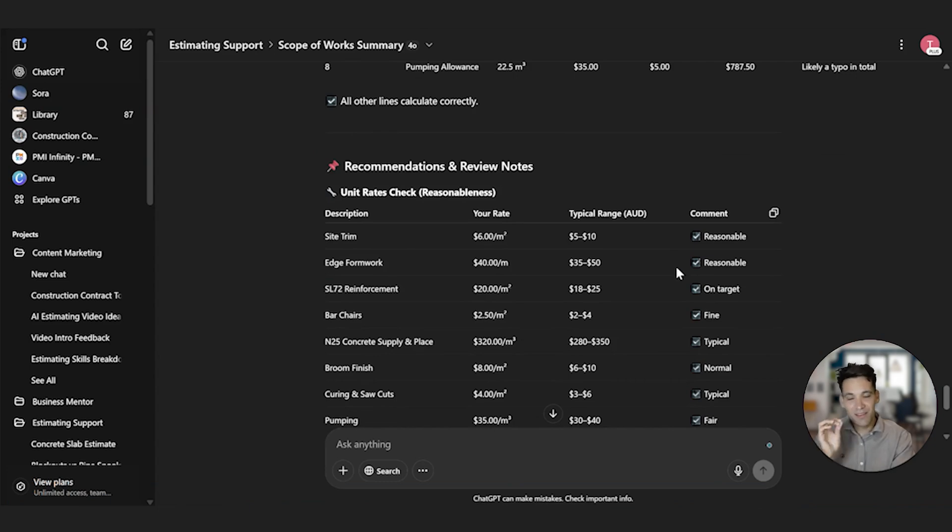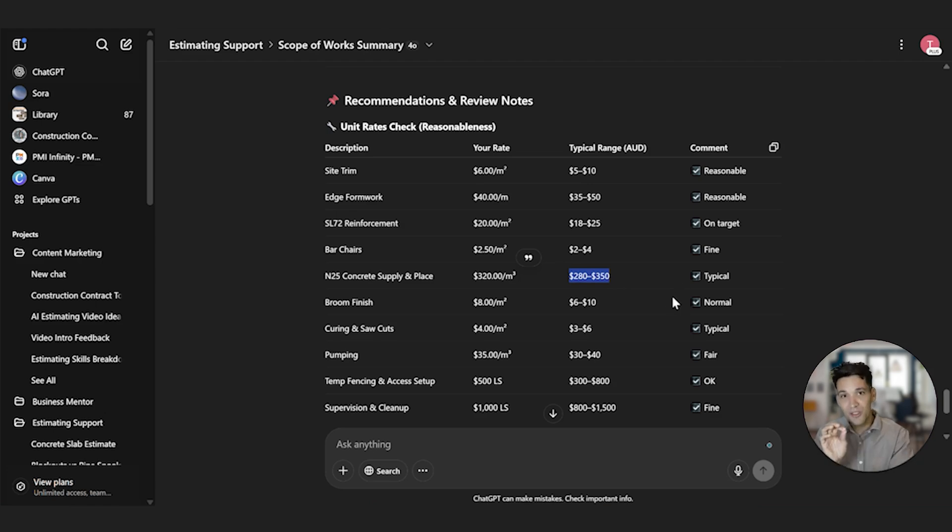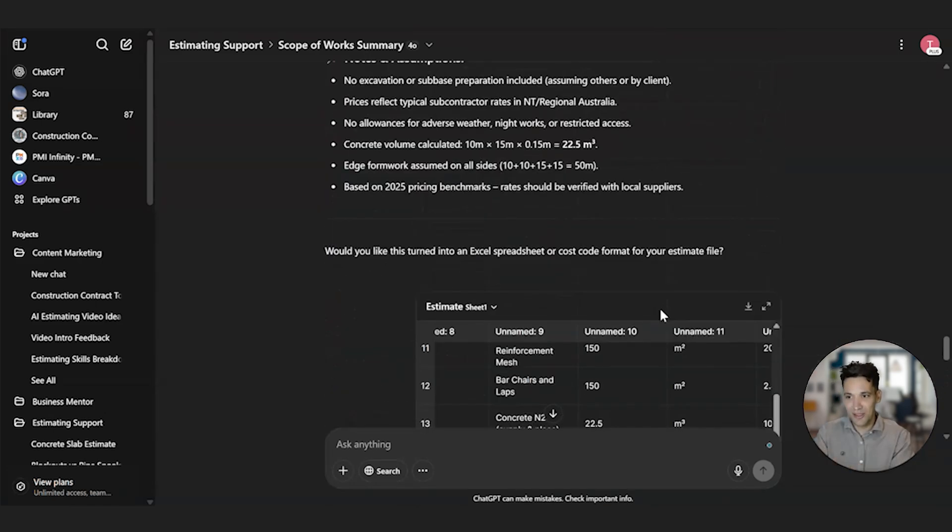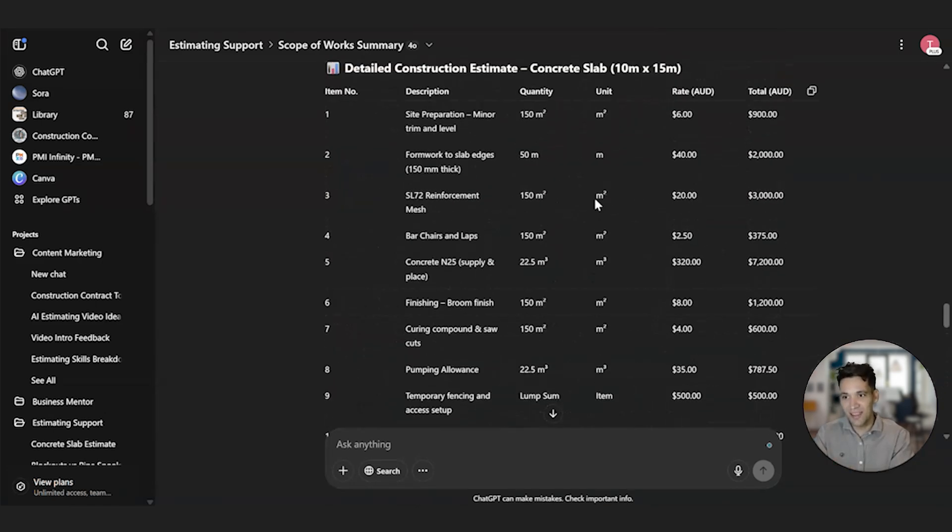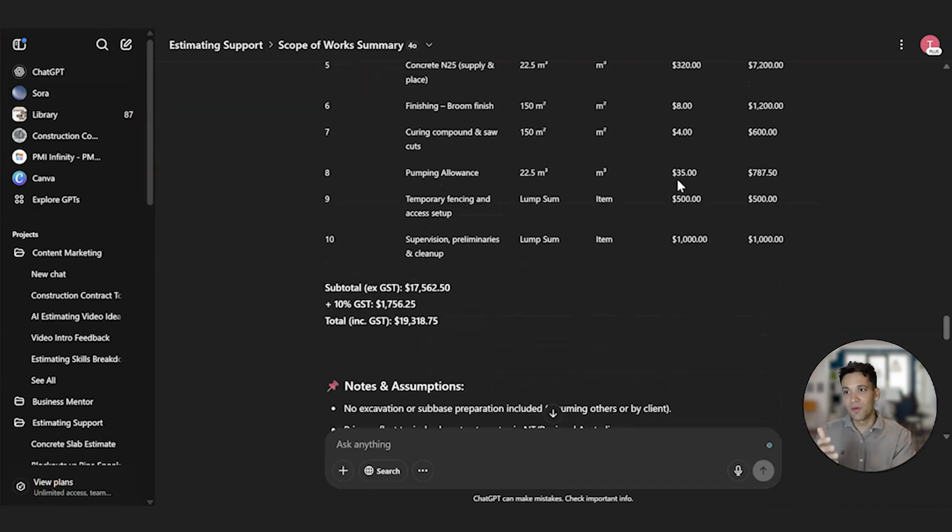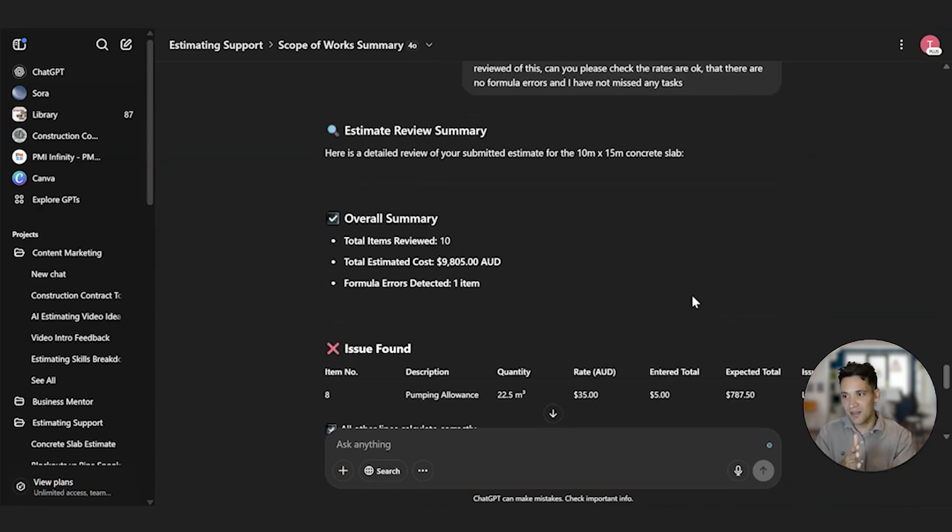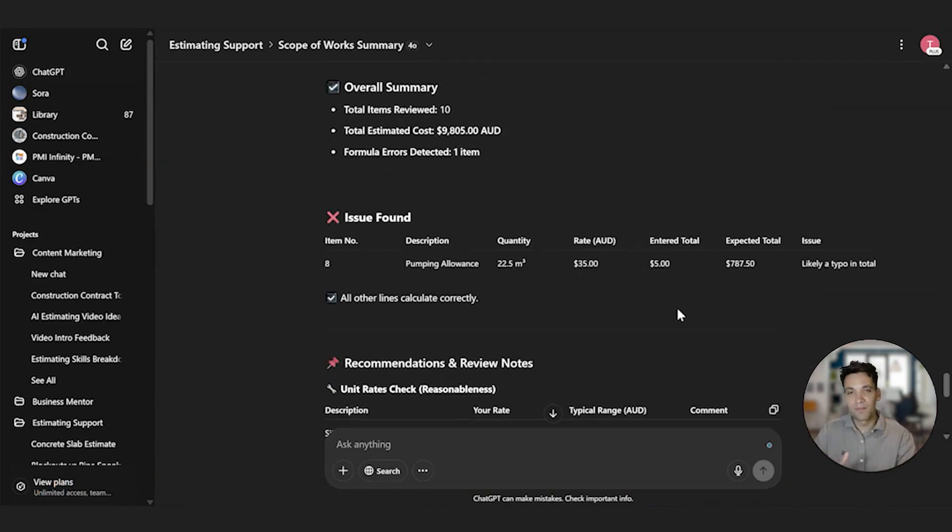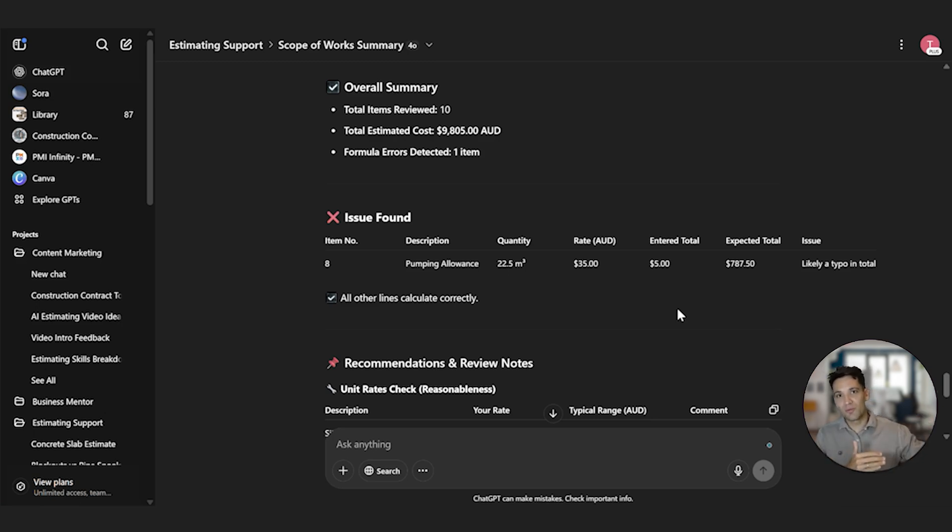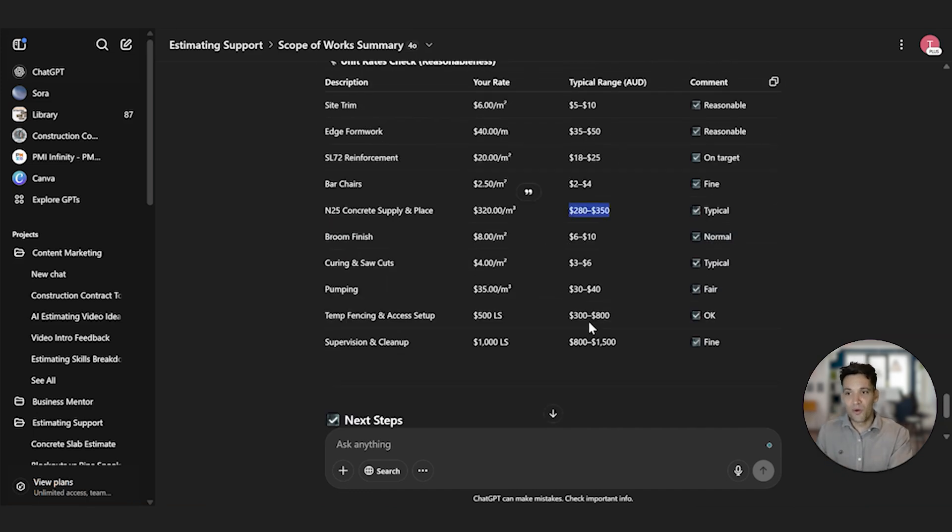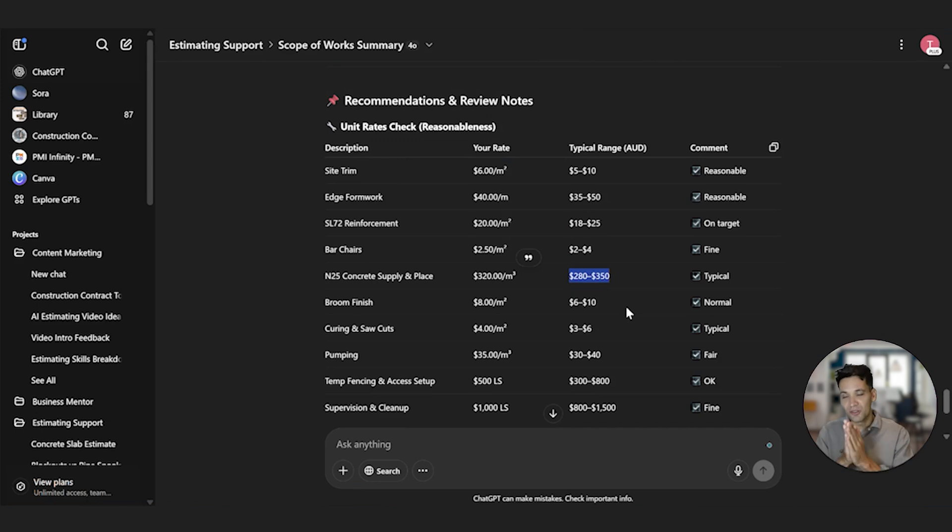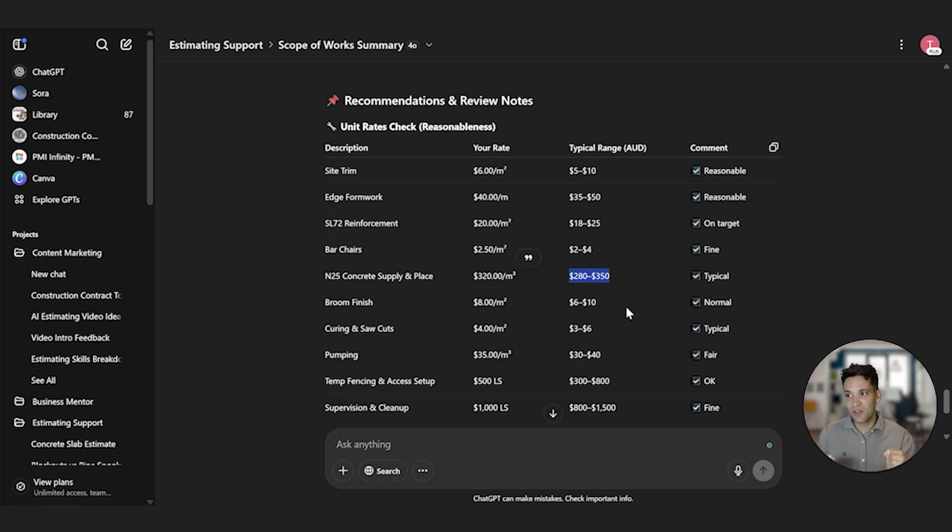However, it hasn't picked up the incorrect concrete rate. It's actually said this when it's checked the unit rates. It said concrete supplied 280 to 350, which isn't the rate I use in the estimate, but this is typical. Now what's likely happened is because I actually used ChatGPT to originally create this estimate, it's got confused between document uploaded and the table above. That's why when you're doing different tasks in ChatGPT, it's always better to use different tabs because it's a term called a context window. And it's when it looks back at the past information, if you have conflicting information, can potentially get confused. But overall, it's a pretty good tool to do this. You'd still like to check it yourself, but it's a good additional layer if you've prompted it correctly. But just remember, try to use different chats for different tasks so the context of the LLM is not getting confused.